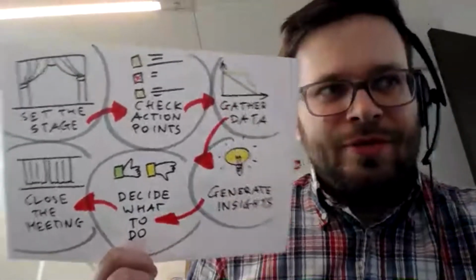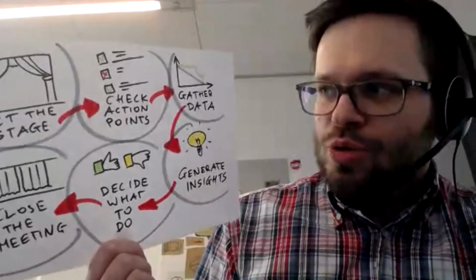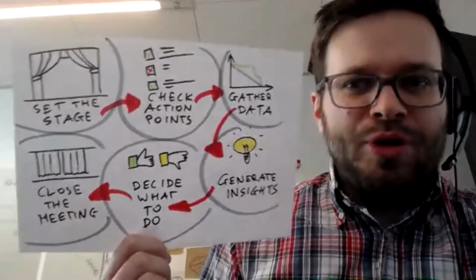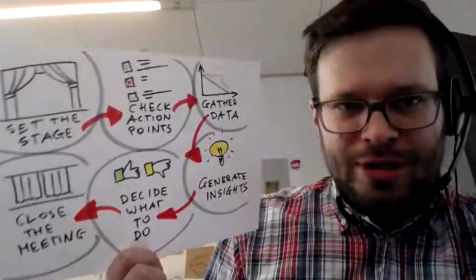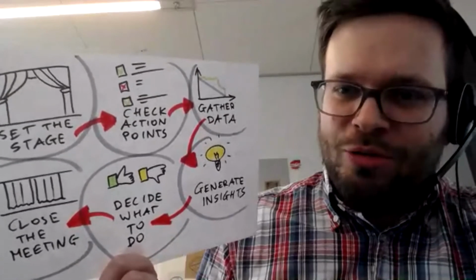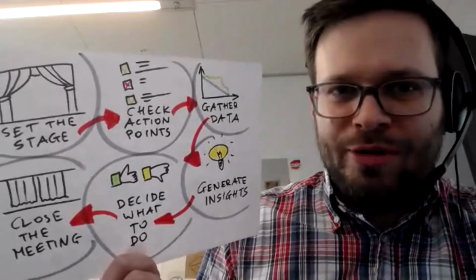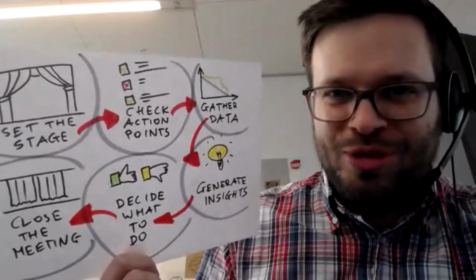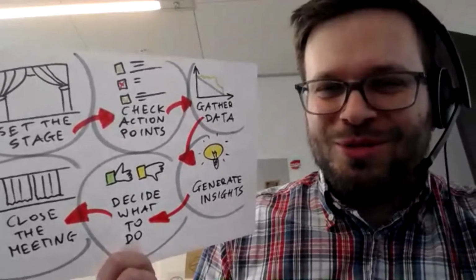Then if this is something like a recurring event, you check what you agreed on in the previous workshop, just to see if it even makes sense to do another workshop. Maybe the top priority thing that we should do is still remaining to be done. So instead of talking, we should go and do this thing.